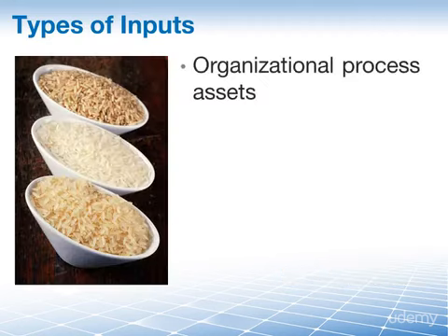Moving on to organizational process assets. They should be utilized throughout the project lifecycle. For instance, using a risk register from a similar type of project might be useful for identifying similar risks on your project. Project process controls are put in place to minimize inherent risk and modified to reduce residual risks. In addition, lessons learned documentation, experience from other project managers, and risk management experts all may contribute to identifying risks, and they're all organizational process assets.